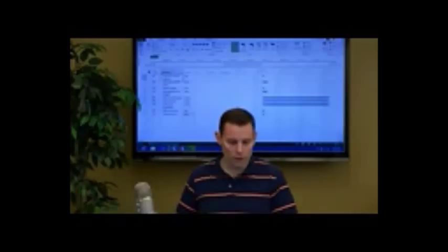What I do then is I switch over the task mode for each of the tasks to auto-scheduled. This allows Project to use its scheduling engine to scatter these across time in an organized fashion. You'll notice the bar changes from a turquoise to a blue, and that's also a signal that, okay, you're serious, we're going to start scheduling things. So I'm going to fill down that task mode down here too, so that all the tasks have that auto-scheduled mode. All right. And now it's time to order these in the right order. Put them in the right sequence.